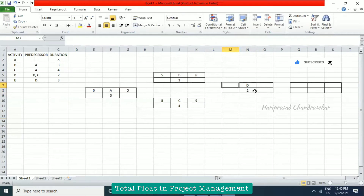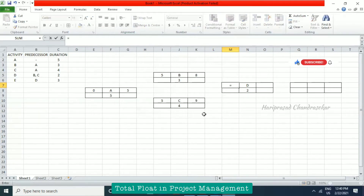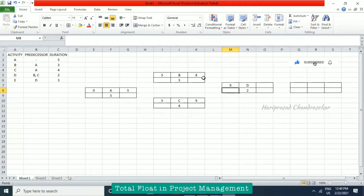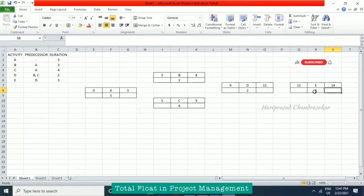For D with predecessors B and C, we must decide whether to take eight or nine as the start. The logic is we take the longest duration — so we take nine. If you take eight instead, you'd be off by one day and your calculations would be wrong. So nine plus two gives eleven. Then activity E has a duration of three, giving eleven plus three equals fourteen days total.